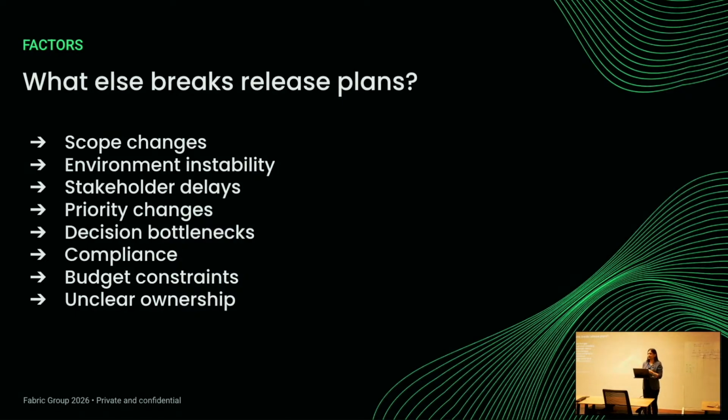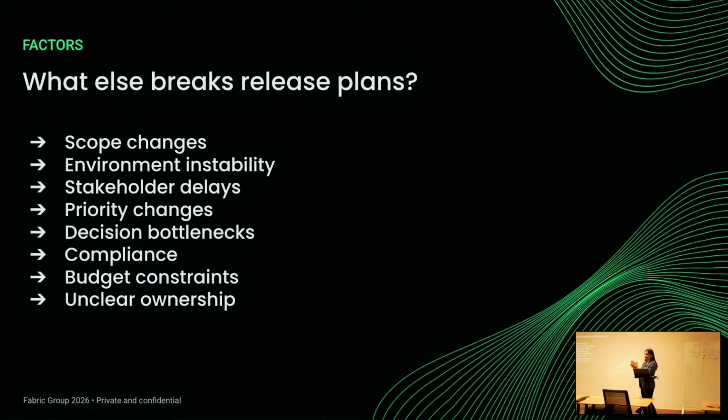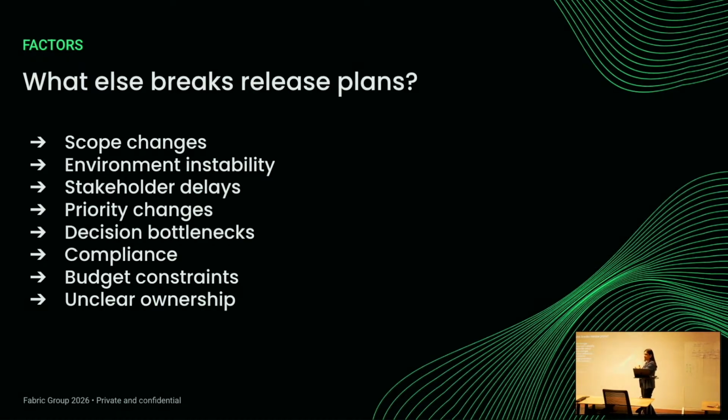So one way to deal with it is aligning on a ways of working workshop. You organize all the right people in the same room and you talk about accountability. Like, you from the client side, this is your role, do you agree? And these are the kind of things that we think you should do, do you agree? So it's a collaboration and alignment with the clients to solidify the roles and define accountability, right?